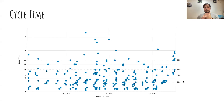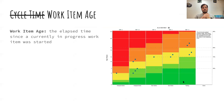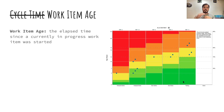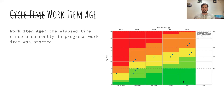Next we'll talk about cycle time, but I want to introduce a related metric: work item age. For me, this is the most important thing for teams to hear about — something people don't know a lot about, a little bit hidden, but incredibly useful. Work item age is the elapsed time since current WIP was started — it's a leading indicator of cycle time. If each of these cards were to finish today, the work item age would become the cycle time. As a work item gets older and older, we can expect an older and older cycle time to come eventually.